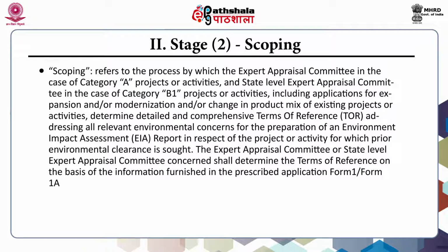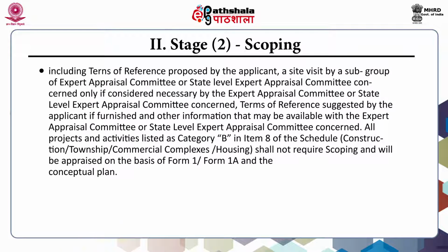The expert appraisal committee or state level expert appraisal committee concerned shall determine the terms of reference on the basis of the information furnished in the prescribed application Form 1 or 1A, including terms of reference proposed by the applicant; a site visit by a subgroup of the expert appraisal committee or state level expert appraisal committee concerned, only if considered necessary; terms of reference suggested by the applicant if furnished; and other information that may be available with the expert appraisal committee or state level expert appraisal committee concerned.